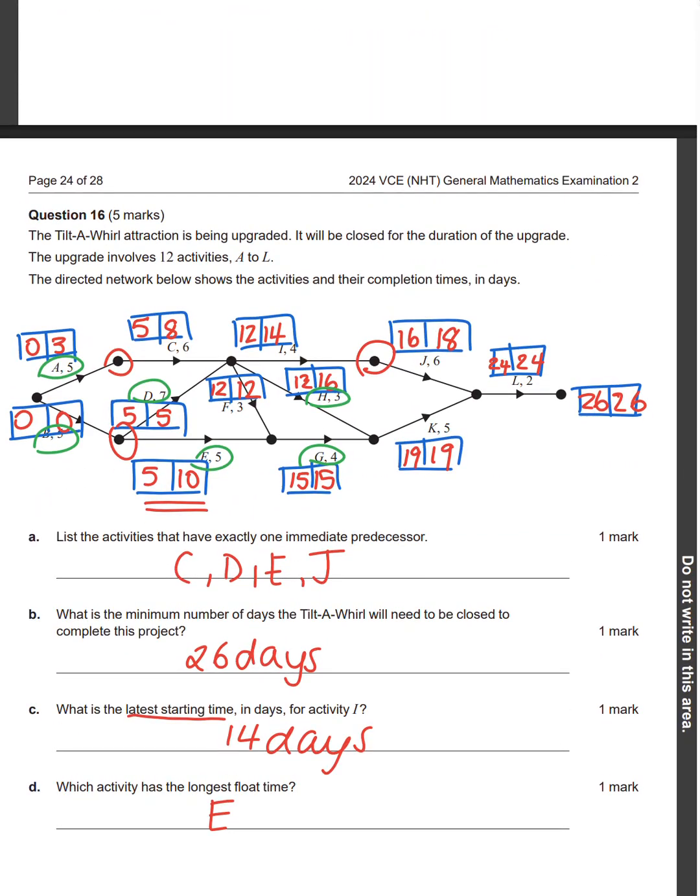Okay, so let's say we do reduce that to 3. So then this one will become 3 and that will become 9. So let's see if we can get everything else going there to become 9. So this pathway here needs to be 9. So we've got 5 and 7. We can reduce them. So 5 and 7 is 12. So we need to take 3 off them. Now we said that D was the most expensive. So if I take 1 off D, I can take 2 off B. And that way that's going to be 9. So that's going to work.